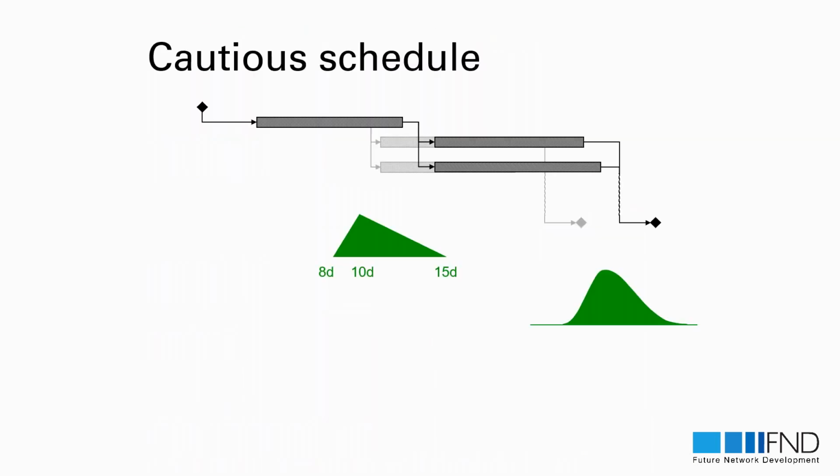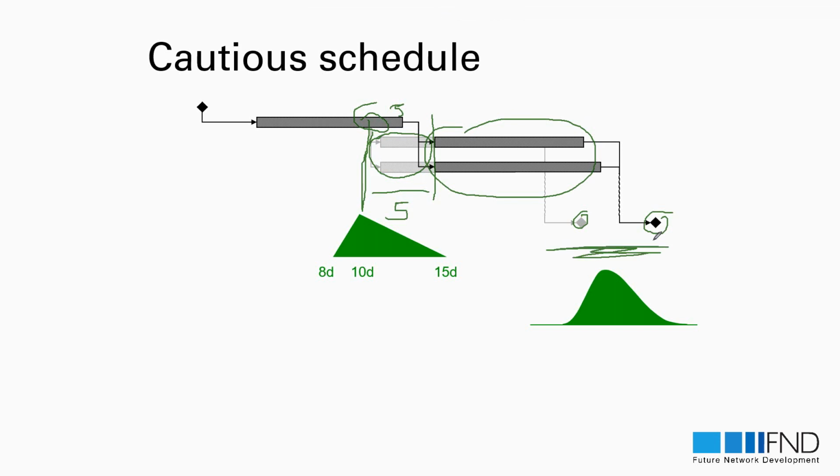If you look at it from a pessimistic approach, we have a 10 days job, and this was my 10 days estimation, but I put 5 days here in my schedule, so it moved to a late start, and I created a 5 days gap for the remaining work. Of course, my project is postponed because of my estimation, all right?